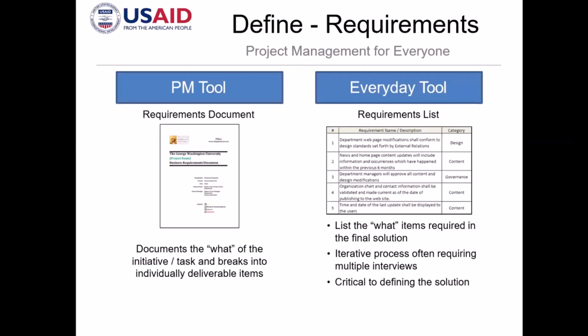The major document that you have to produce is the project charter, the high level contract, right, that we have mentioned. But I specified here a requirements document that should be attached or should be an appendix to the project charter, so that there would be no other things that will be left behind in defining the requirements, because the requirements list is already the outline of your scope, right?